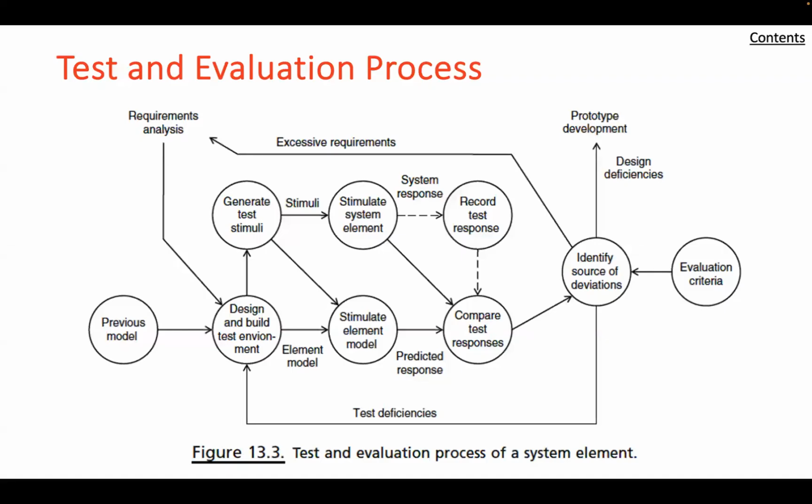Well, one has to validate the test equipment before you can actually validate the hardware. And so it's going to be something similar. Like any system element, test equipment for system design validation itself requires test and validation to ensure that it's sufficiently accurate and reliable to serve as a measure of system performance. So you're measuring your development hardware, and you don't want to have the test equipment be in the way, and so that's something that must be done.